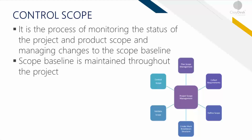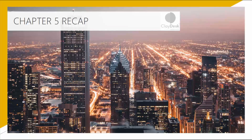Baseline simply means that you have dates allocated to each subtask, but those dates could change because of holidays you didn't account for, employees being shuffled around, or client delays. So you create a baseline date so everything is baselined from your actual plan. In this chapter, we took a look at project scope management — how to lay out the scope, how to become transparent, and how to create the WBS. Your role as a project manager is to ensure the project tasks and scope remain within the set boundaries and meet the expectations of both the client and all stakeholders. If you have any questions, post them in the discussion area, and let's move to the next lesson.